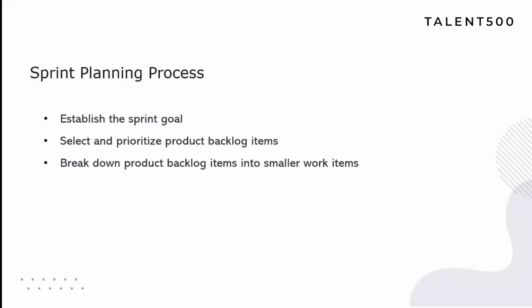Now let's talk about the flexible plan. The Scrum team should talk about how they intend to deliver the product backlog items they choose for the sprint during sprint planning. They don't have to go into every single detail or the minutest detail about each day's activity, but they should have enough of a plan to get started, leaving the remaining details to come to them during the sprint.